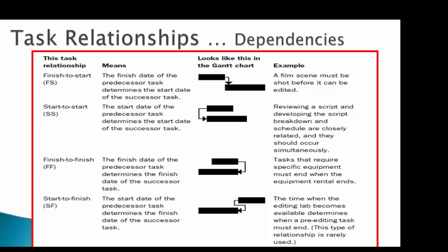This chart is a reminder of the different types of dependencies. The finish to start dependency is the most common, and it's a good one to use for all tasks when you are just starting to learn MS Project. During this course, we will only look at the FS dependency. Using the FS dependency makes the plan more dynamic, with the downside that you may need to track some project information in a different way. In this segment, the notes and hyperlinks are good places to store some information.